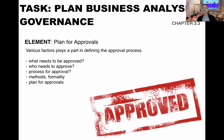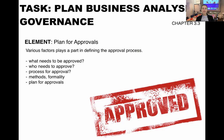Now let's look at the element plan for approvals. It's a really useful and important thing to plan for because it helps you transition from draft to final documents much more smoothly when you have a clearly defined process. First, decide what needs to be approved — which types of artifacts will need approval. Who needs to approve them? How do we get approval — is it structured walkthroughs, email reviews, one-on-one meetings? What process will we follow? Make sure approvals are in the project plan so there's enough time to get documents out and approved.